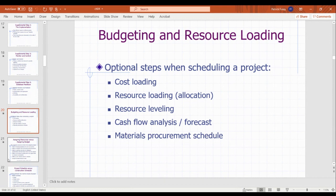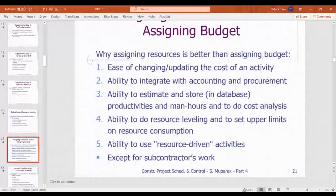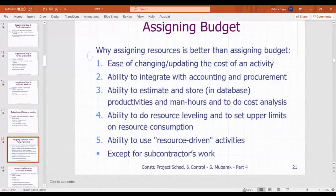And materials procurement, that's always actually a big thing. I probably didn't touch too much on that. When we're talking about procurement, it can be a year. When I would replace a good sized transformer at a substation, it was 12 to 14 months to get the new transformer on site and in operation.